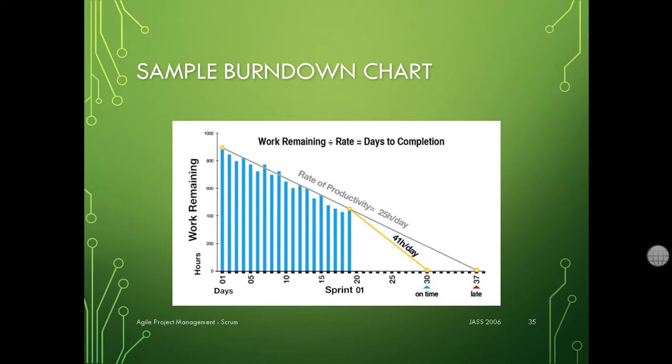And when you have that, you can make a chart that will tell how long you have before you have no work at all, which means that you have done the job you need to do, right? That's what we're going to go over next session. Yes, I'm just pointing that out quickly. And just to be clear too, that's why some people do not like Trello, because it doesn't have a clear place to have the weight. Okay? And they have to build that burn down chart themselves.